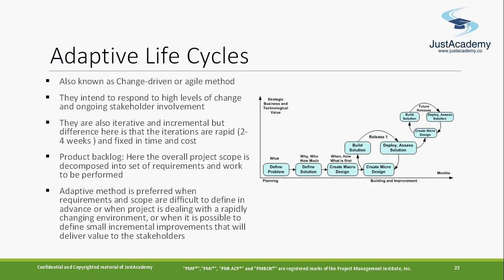What is the basic concept of Agile? It tries to complete the requirements which are high priority first, and deliver them. They break the whole requirement down into smaller user stories, and there is a sprint. Product backlog is a list of the requirements or user stories. The sprint takes about 1 month: how many user stories can be built, tested, and go live. Then they start another sprint. In one sprint, their job is to take high priority requirements first. That's the most important thing.